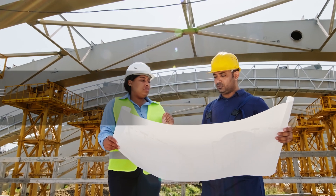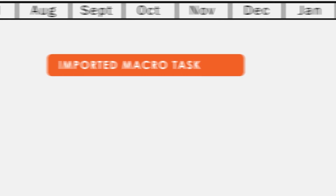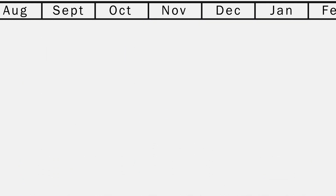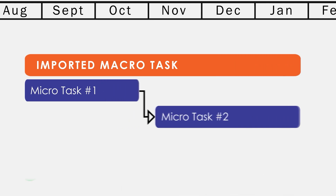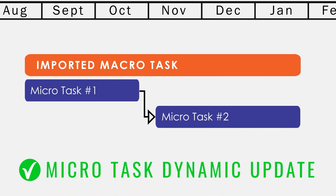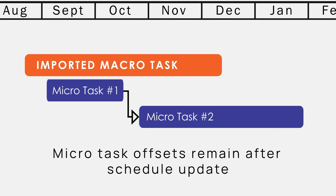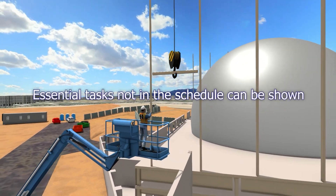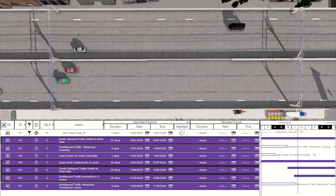Other solutions have tried to combine the two areas, but with difficulties. Fuser has created a new micro-schedule logic which does not affect macro-schedule tasks and automatically adjusts with macro-schedule updates. In Fuser, micro-tasks can also be offset from macro-task dates, allowing you to schedule essential tasks that do not fall within the macro-schedule logic.